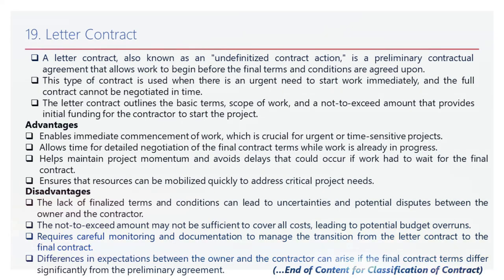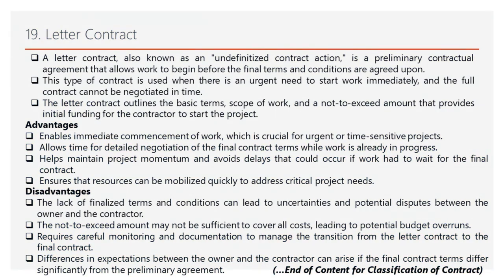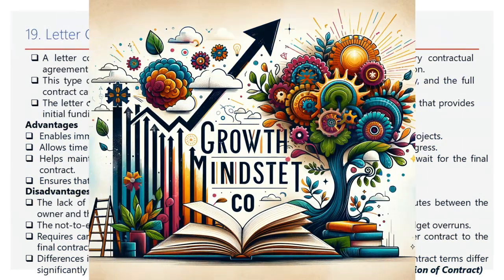Disadvantages of the letter contract: uncertainty in terms — the lack of finalized terms can lead to uncertainties and potential disputes as the project progresses. Budget limitations: the not-to-exceed amount may not be sufficient to cover all costs, leading to potential budget overruns. Ongoing monitoring needed: requires careful monitoring and documentation to manage the transition from the letter contract to the final contract. Misalignment in expectations: differences in expectations can arise if the final contract terms differ significantly from the preliminary agreement.